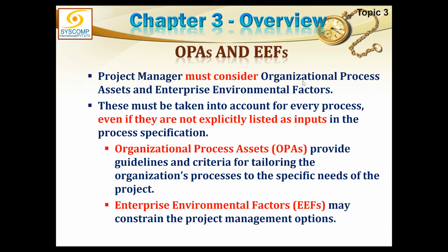They were the policies, procedures, rules, regulations, formats, templates, standards, lessons learned, old files, registers, and all that. So these were mostly documentary. Whereas enterprise environmental factors were the internal and external factors, not essentially documents, but like culture, weather, and things like that, which can impact your project.